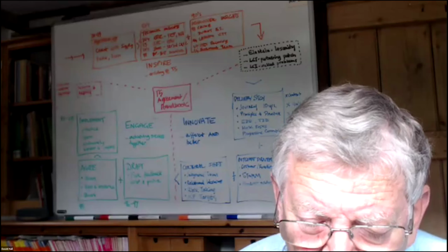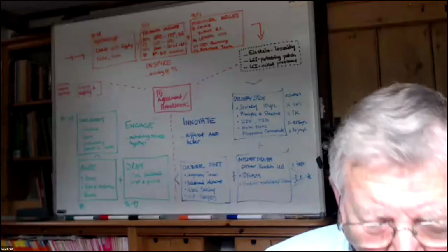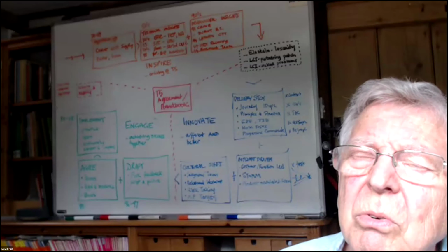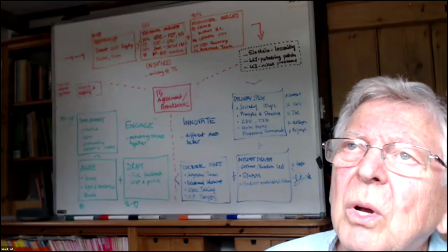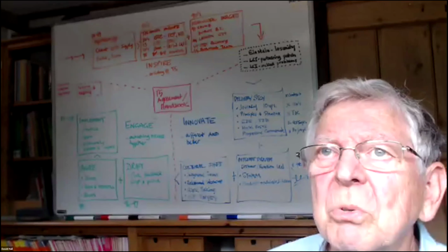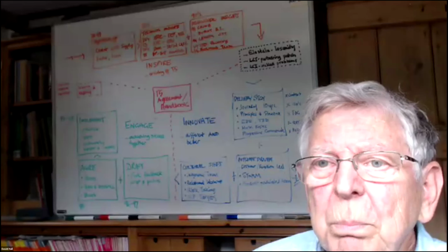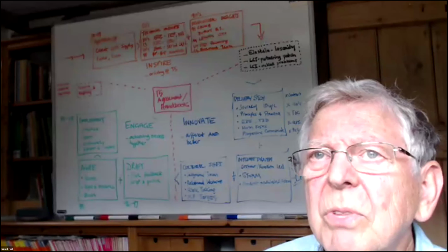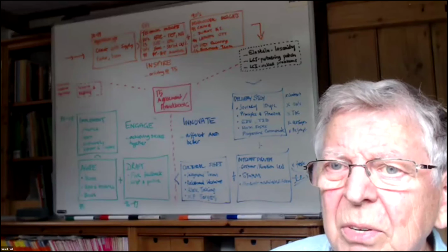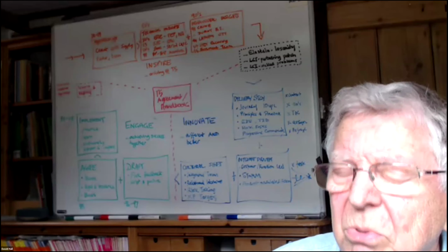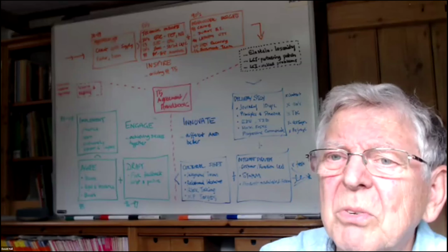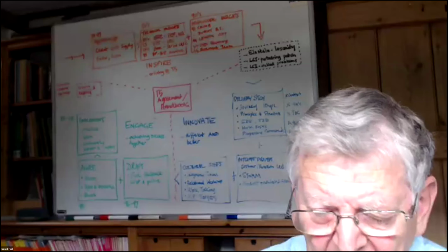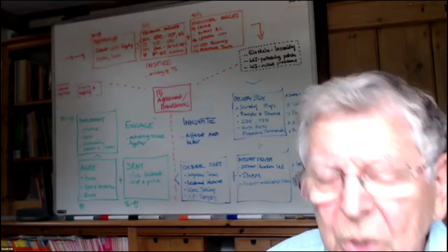And within that delivery strategy and that time length, we really made two big decisions around it being different. One was that the commercial arrangements would be progressive, not set at the start. Just the commercial elements were set at the start, but the actual mechanisms and the payments and the agreement on whether you fixed or reimbursed would occur over time as you knew more.